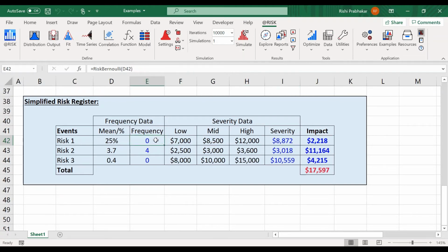The frequency, now that's another interesting one. You might model a large frequency, something that has a lot of potential outcomes, as a continuous function. In this particular instance, At-risk will round a fractional frequency returned value to the nearest integer and then perform that many samples. So there's not really much in the way of limitations on what these things could be, because the compound will always return you an integer for this, and then this calculation is simply whatever that calculation is. So At-risk should be able to do that for you.